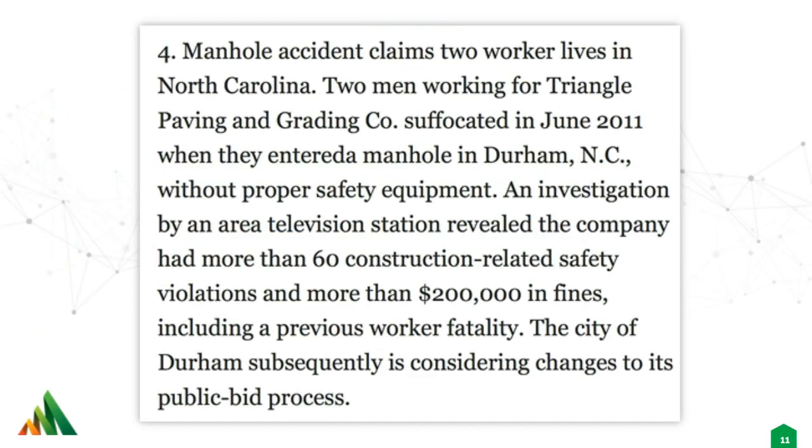This was the article that was written. There's a misspelling in here, but that's the way the article was printed. But the bottom line, and you can look at the last sentence, it said the city of Durham subsequently is considering changes in their public bid process. And what those changes were is to do contractor pre-qualification and include safety as a key criteria in awarding these